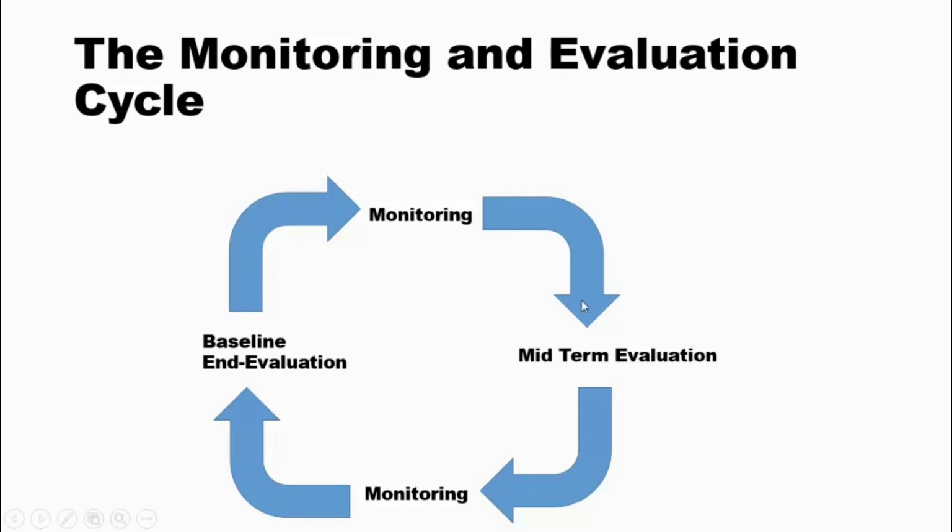But when we come to the midterm evaluation, this is an evaluation that is done midway through the project implementation timeframe. So the midterm evaluation is done usually to measure the results achieved at the higher level indicators such as the outcome and impact.